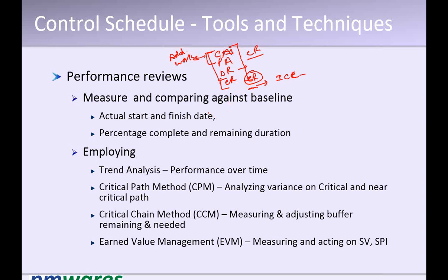Right? But when we do the corrective, preventive and the defect resolution, in this case also do we need to go back to the change control board, or is this more on the project manager to manage these things? Probably you can put guidelines on what kind of changes will go to the change control board, and what kind of changes are not required. The change control board and the project plan can delegate authority to the project manager. You decide on that. Correct.